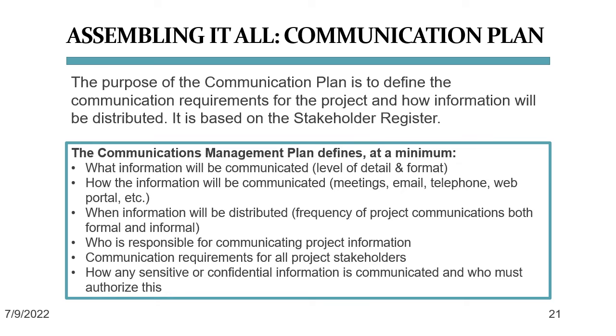The communication management plan defines at a minimum what information will be communicated and the level of detail and format, how the information will be communicated: meetings, email, telephone, web portal, etc., and when information will be distributed, which includes the frequency of project communications, both formal and informal.